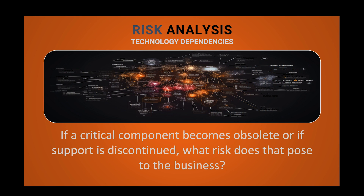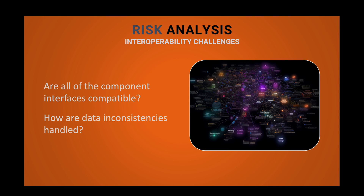Identify risks associated with dependencies on specific technologies, platforms, or vendors. Consider the potential impact if a critical technology component becomes obsolete, experiences compatibility issues, or if the vendor's support is discontinued. Mitigate these risks by diversifying technology options or establishing contingency plans. The integration of diverse systems and technologies may introduce risks related to interoperability. Identify potential risks such as data inconsistencies, communication failures, or incompatible interfaces between systems. Assess the impact of these risks on the overall architecture and plan for appropriate mitigation measures.